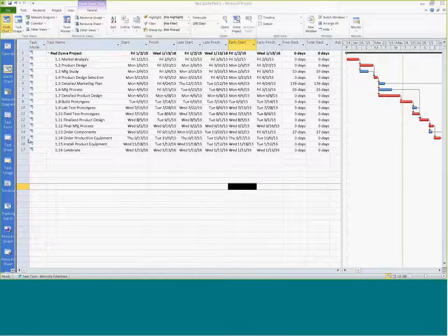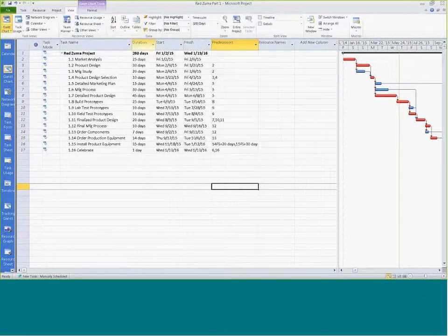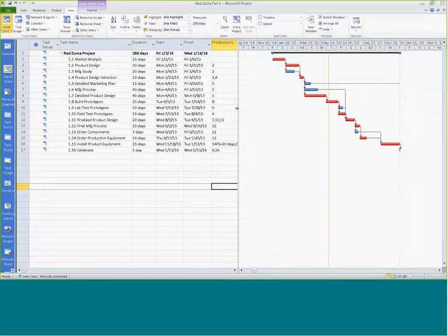And how sensitive is the network? For that, we need to take a look at the critical path, and I like to look at it in this entry view when I'm looking at the Gantt chart. I would look at how many of these items are red. How many total activities do we have in our project? Well, we have 16, and 1, 2, 3, 4, 5 of those are blue, which means 10 of our activities are on the critical path, even if we take out the start and stop nodes.